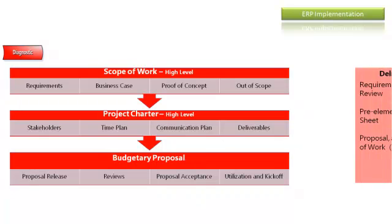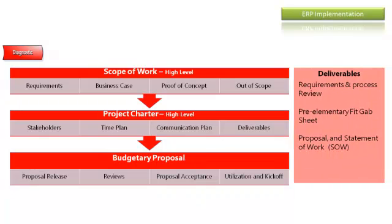The budgetary proposal is released and reviewed in the Diagnostic phase. If it is accepted, the project moves to utilization and kickoff. The main deliverables of the Diagnostic phase include a high-level requirements and business process review, a preliminary fit-gap sheet showing how far the application fits the customer's requirements.